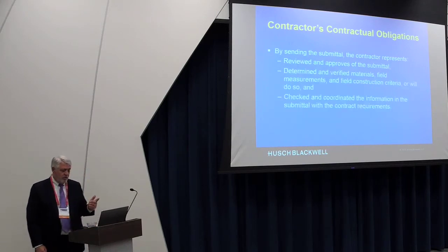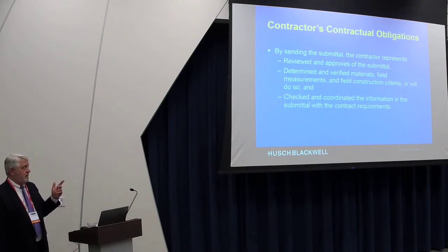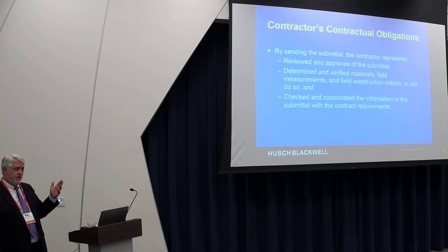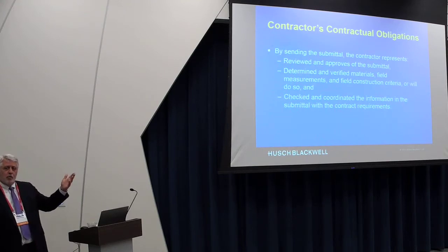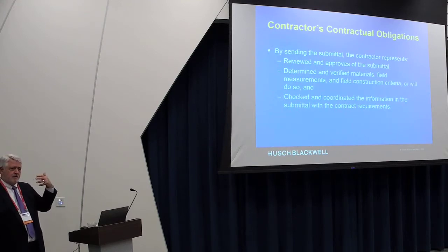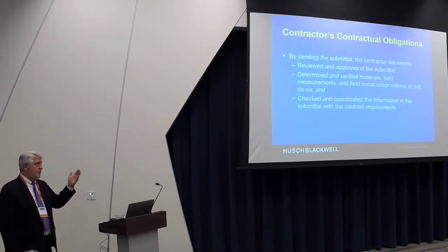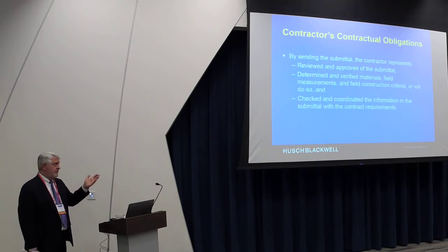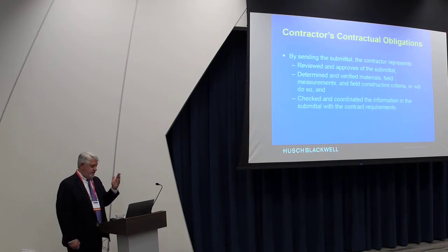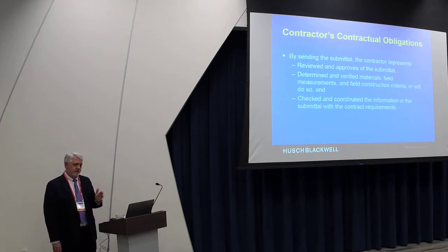That review and approval includes verifying the materials that are included. And when I say verify, I mean verifying that it is in keeping with the plans and specifications, that appropriate field measures were taken and it'll work. The pieces will all go together. In the language of a political science major, the pieces will all go together. That they looked at the field and this works with the field criteria, or there's a reasonable belief that it will. And they've checked on the other portion of the contract requirements, and this is coordinated with those other portions of the contract requirements.